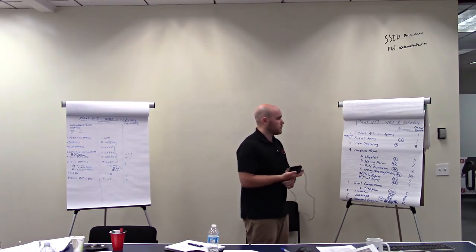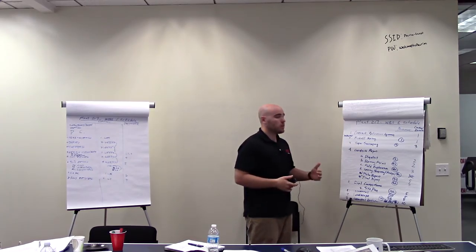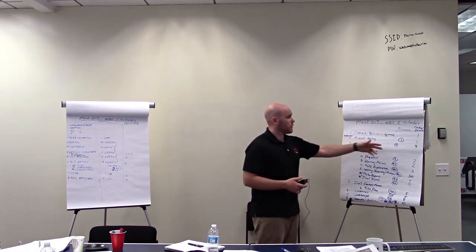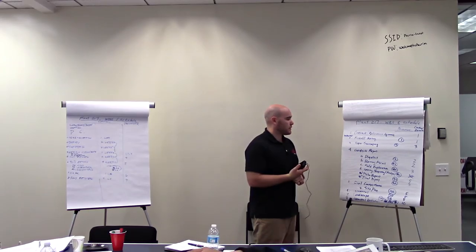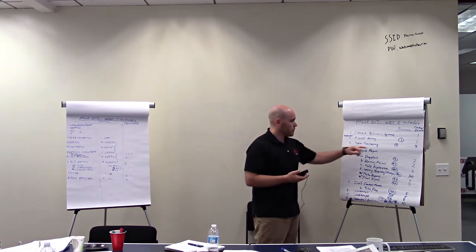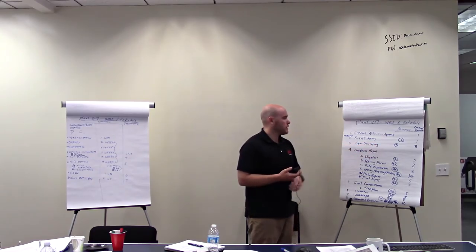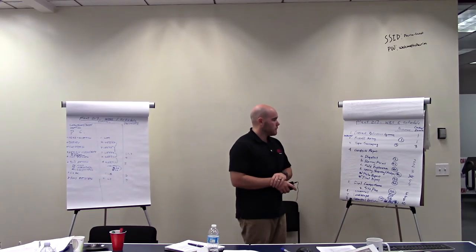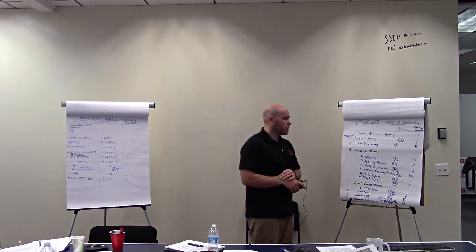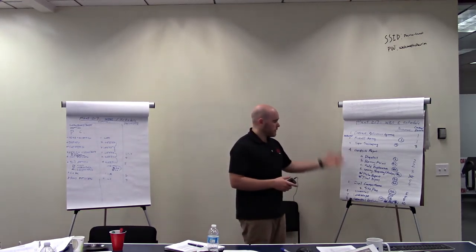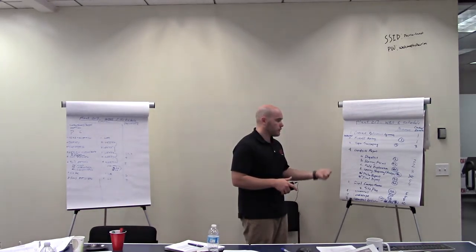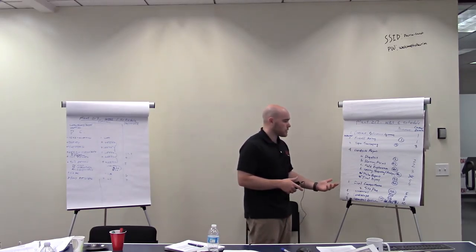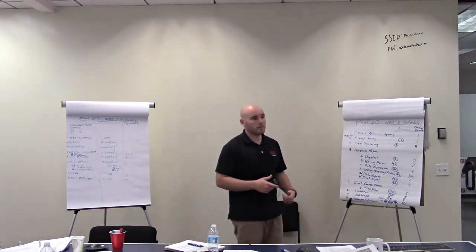So the first step is contract or subcontract agreements. Get those in place. Can't do anything until we have those done. The next thing is a kickoff meeting to identify the client needs and properly kick off with all the sub-consultants. Then we said TOPO would be the next step, would take about 3 days, assuming they don't have any work either, about a day for survey and 2 days for data entry. So the predecessor for the TOPO survey would be the kickoff meeting, obviously.